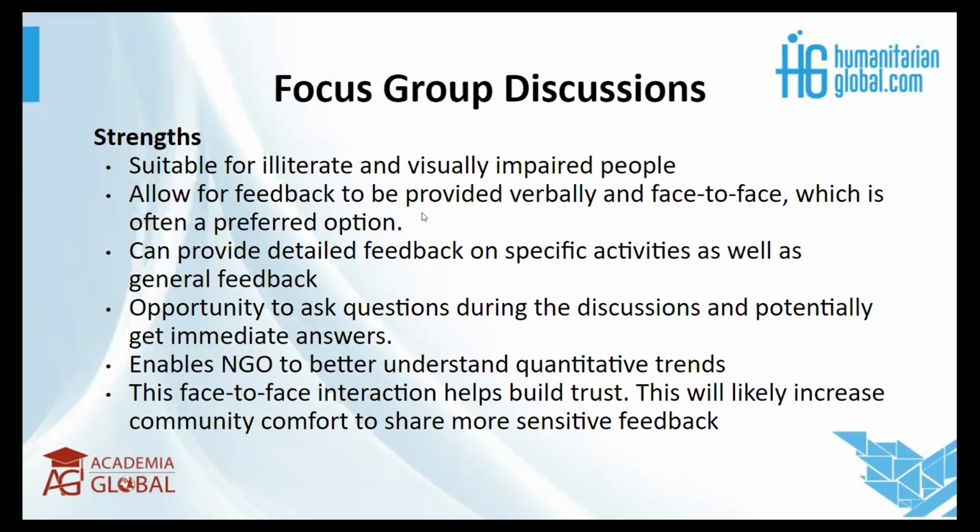Then it also allows for a preferred, verbal face-to-face approach, where people are able to open up a little bit more and clarify issues, and you're able to understand issues a little bit more in depth as the NGO staff. And then at the same time, you can still provide detailed feedback on specific activities, especially what are the solutions or what is being done and when, in terms of timeline, so that you also limit the expectations and for people to understand the project or program better.